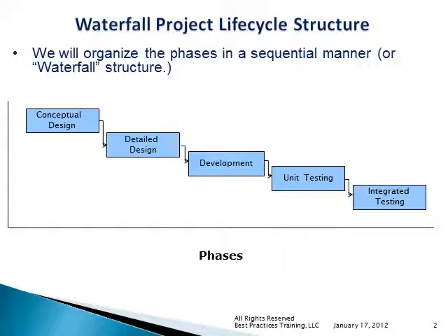But we get it all packaged up, we tie a bow around it, and then we hand it down to the people working on the next phase, the detailed design specs. And this is all about taking our functional specs and decomposing things, going into a lot more detail, and figuring out the system architecture, breaking down the application in a modular top-down way from applications into programs, programs into modules, modules into paragraphs, and perhaps even smaller pieces. Define the file layouts, define the database schema, and put together this subsystem spec. And of course that could take a couple of months at least, or longer.